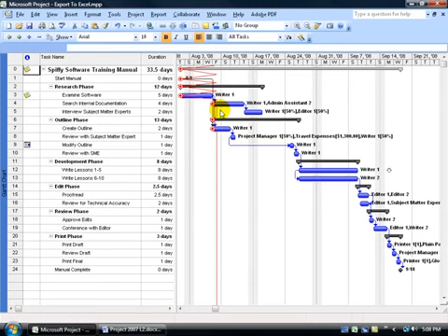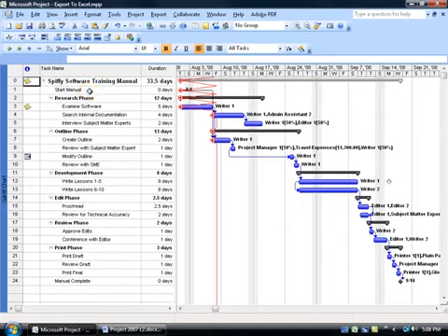Now I know we haven't learned how to start entering actual working times or values, and I'll show you that in the next training video, how to enter a task progress. But really quickly, let me show you what it's like when a task is finished or finished ahead of schedule with this progress line based upon the status date. I'm going to right click on any one of these toolbars and go down to Tracking. This is one way that you can enter a task progress: come down below, select the task, and then come up here and check whether it's 75% complete, 50% complete, or 100%.